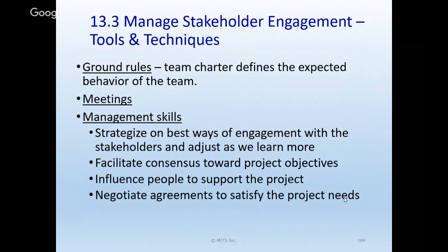Tools and techniques. Well, in the team, I guess we saw this a little bit in resource management, because that's where the team charter was actually defined and built out. Probably has ground rules in it, how the team's going to work together. This is talking more specifically about the project team here, I think, but probably other stakeholders we might be involved with. How we're going to handle meetings. PMI is pretty clear about having meetings with very set agendas, start and end times, get the minutes out right away, any action items assigned out, and don't let it wander on like our old meetings did for 3.5 hours.